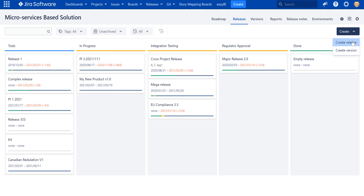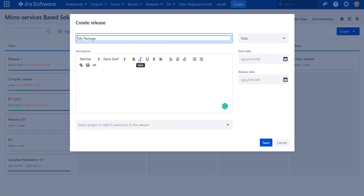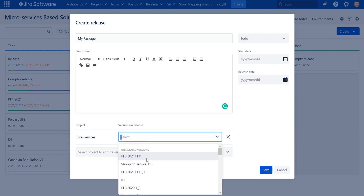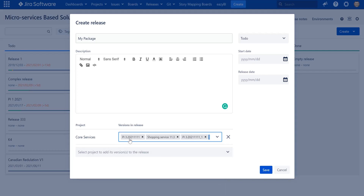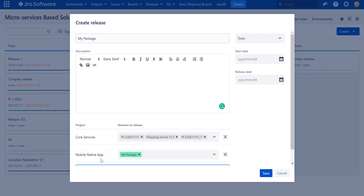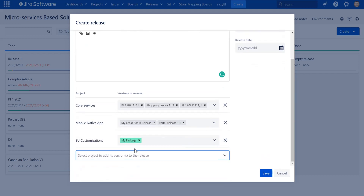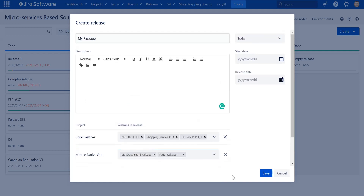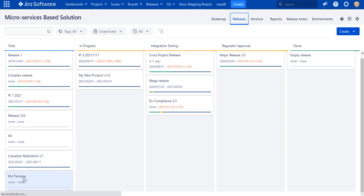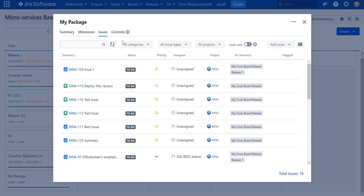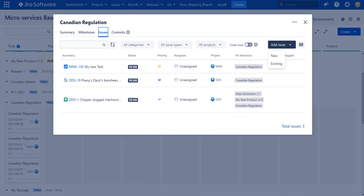Let's simulate another case — creating a package of multiple already-existing versions to track as one entity. I'm creating a new release called 'My Package.' Instead of creating new versions, I can select already-created versions to track in scope of this release. I can choose versions from Core Services, a couple from Mobile Native Application, and add GDPR from the European Union Customization project. Once saved, I can see the total progress across all selected versions and explore all issues in a single place.